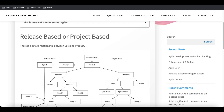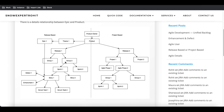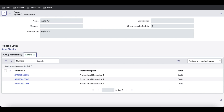So far we have created the theme and the epics. Now it's time to create stories. But before that we need to define the backlog. Whenever a story is created without a sprint assigned, it becomes a backlog item. Backlog means stories that don't have any sprint assigned.